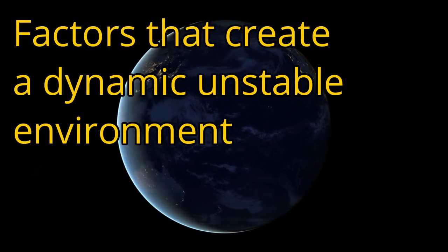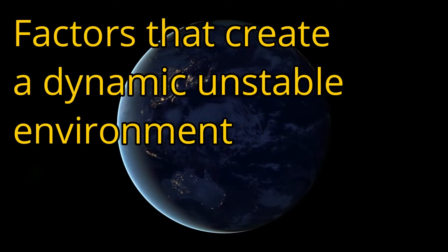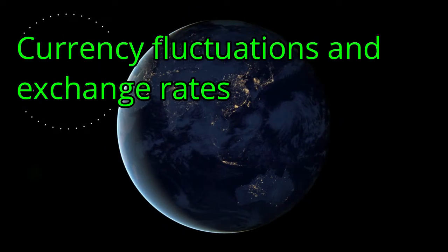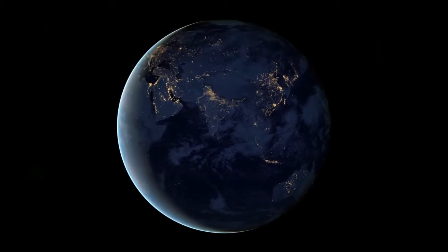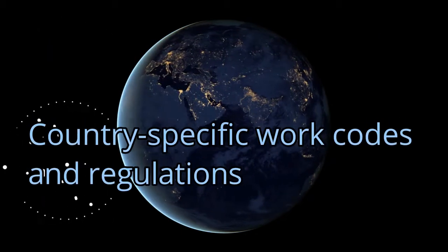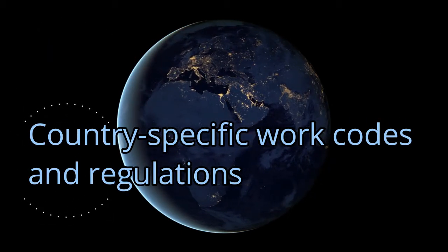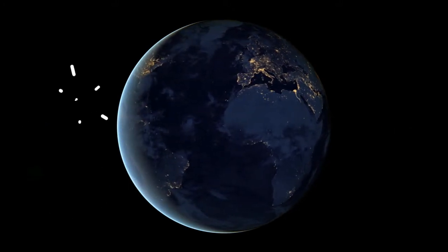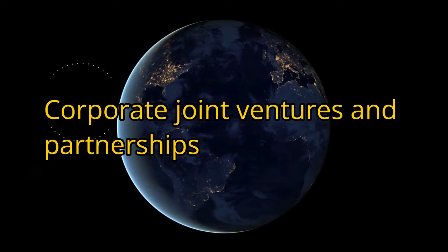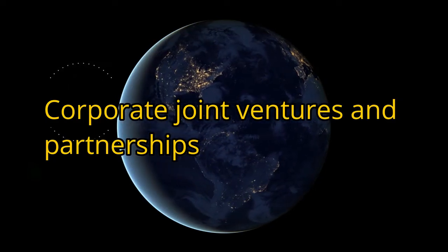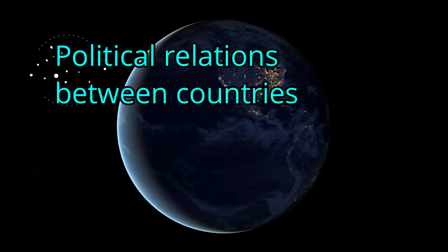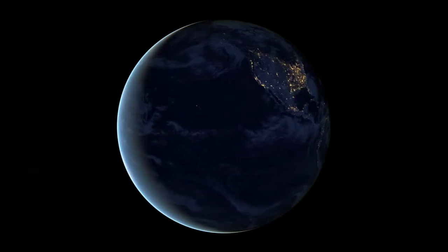Factors can create a dynamic and perhaps unstable environment over the life of a project and include currency fluctuations and exchange rates; country-specific work codes and regulations, such as hours per day, holidays, and religious observances; corporate joint ventures and partnerships creating entities with a presence and facilities in multiple countries; political relations between countries; and availability of high-demand workforce skills.